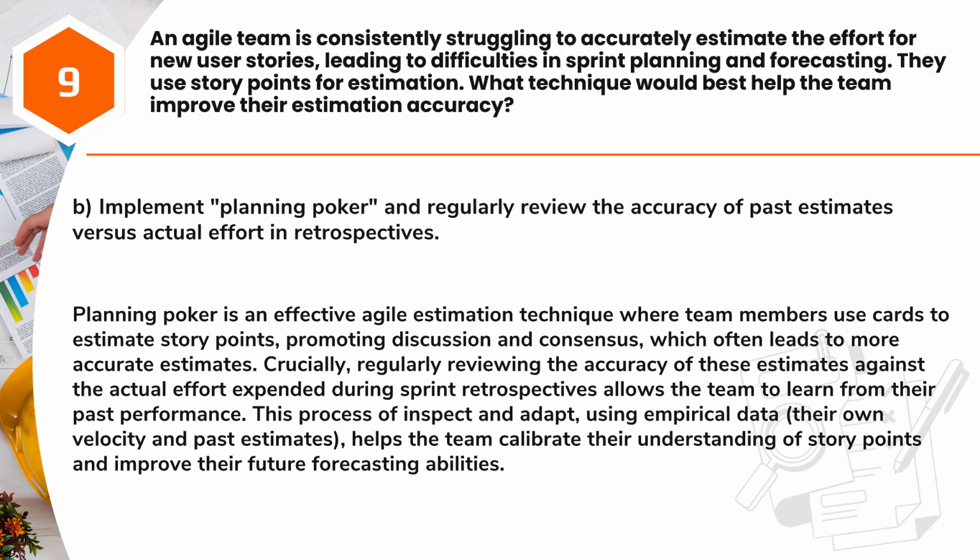Answer: B. Implement planning poker and regularly review the accuracy of past estimates versus actual effort in retrospectives. Planning poker is an effective Agile estimation technique where team members use cards to estimate story points, promoting discussion and consensus, which often leads to more accurate estimates.